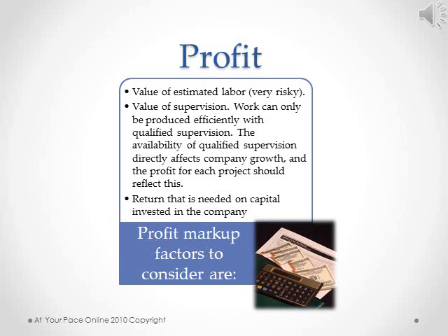Profit markup factors to consider are value of estimated labor, value of supervision, work can only be produced efficiently with qualified supervision. The availability of qualified supervision directly affects company growth, and the profit for each project should reflect this. Return that is needed on capital invested in the company.